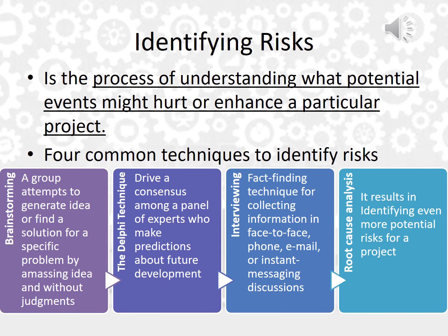But now, speaking about risk identification techniques, interviews can actually be used to identify risk using these similar approaches. For example, if a new project involves using a particular type of hardware or software, people who had recent experience with that hardware or software could describe the problems on past projects.